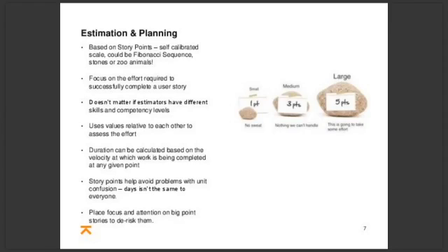I think lastly on these points about point-based planning, story points are a good way to avoid unit confusion. I think it was mentioned on a previous slide that a working day is different for everyone, for example. So by using a different sort of scale, we get around this. And lastly, pointing allows us to group items into groups, and we can put more emphasis on the higher items accordingly. That way we can focus our attention on what might be more risky and look to de-risk them.